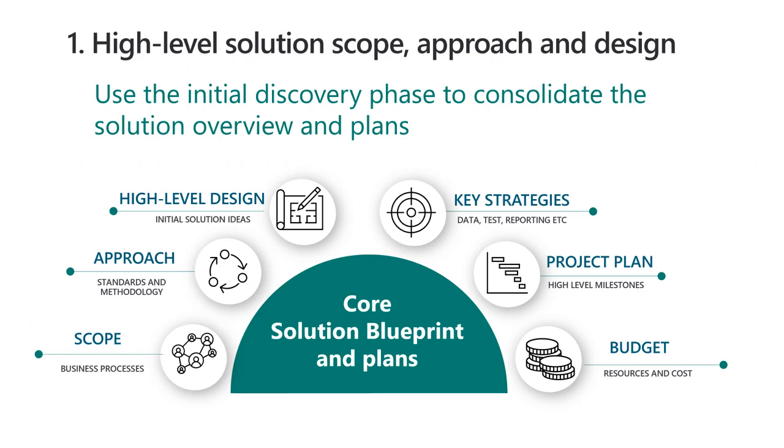You should have a high-level design. And again, these are your initial solution ideas of how this is going to get delivered through Dynamics 365 application. This doesn't mean you know the answer to every single requirement. It doesn't mean you know the design down to the lowest level of detail, but you have some idea of the modules you're going to use. You have some idea of how the delivery of the processes in scope are going to work. You have some idea of the related effort. You have some idea of the gaps that you may need to fill. In other words, you're not walking into this completely blind.